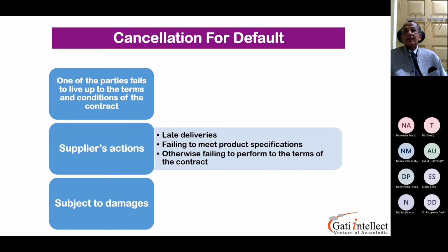Then what you can do is you give them a notice of breach of contract, number 1. Then you ask for explanation. Understand? You ask for explanation, and also in the same letter, and these things should be drafted along with the legal counsel, and with your own expertise in applications. There you can give them a time frame for correction. They have to give you a proper explanation.